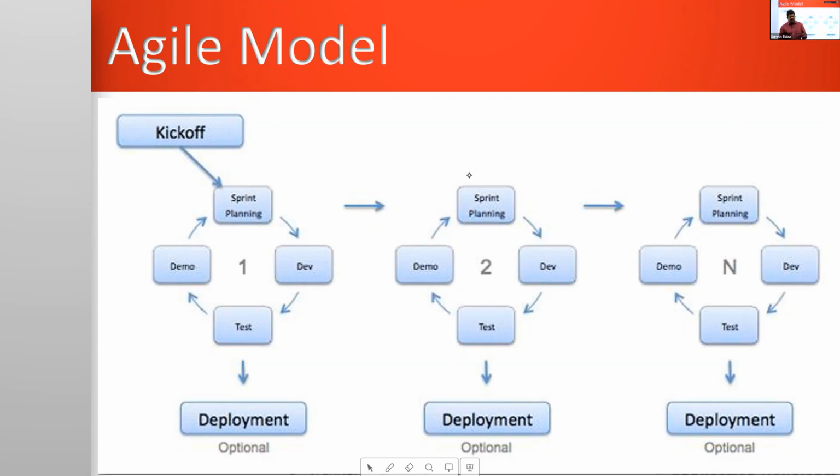Once the requirements are fully finished, I demonstrate to my client: this week, these are the features we implemented for your business. If you say okay, then we go further. Once the customer confirms, next week we plan other 2-3 major business requirements. Like this, small schedules are made. All 40 requirements will be implemented in 10-20 schedules.